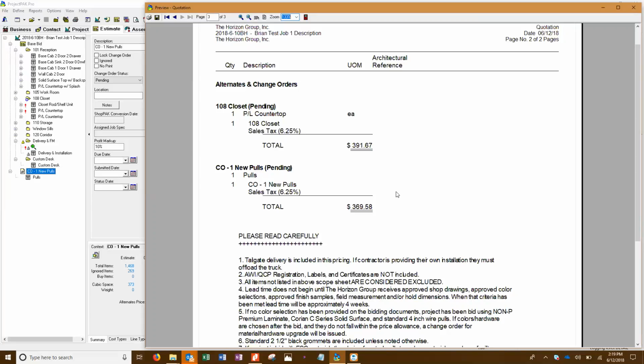I have another customer where their number one thing says, we have not charged sales tax in this quote. If you are taxable, we will add it at billing time. And again, I'm with you, because if they don't even notice it and then they say, well, this guy's way less and you guys had tax in it because it really is taxable. Well, that's not really fair. You didn't win the job then, and that dude's going to charge tax at the end anyway. Right. Blows for you. So figure out what's best for that and go from there.